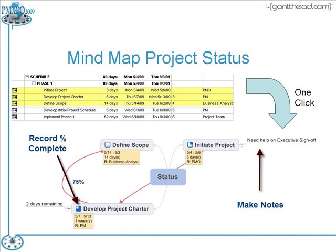In this case, I've exported three tasks: defining scope, initiate the project, and developing the project charter. It already has the individual dates and resources. Now I can have a discussion with the team and update the progress — you see little squares where, for example, the 'develop charter' node is 75% complete and 'initiate project' is 25% complete. What I really like is using this to capture notes about that particular task, which can then feed into a project status report or a formal project management system.